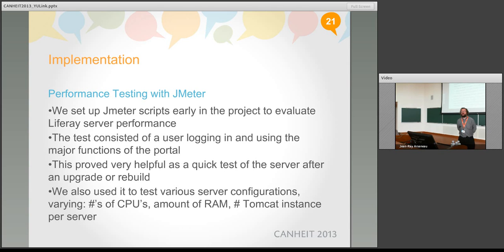So one of the things, again, I would do differently is make sure that there were specific clauses, probably around documentation, so that you can be really severe with a vendor up front and establish a good relationship or not, and then continue on with them or not. And have a roster of vendors. So if you're doing an RFP for something like this, have it result in a roster of developers that you can use for this kind of work, so you can always have options.